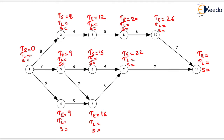For event 11, TE = max(26 + 7, 22 + 9) = max(33, 31) = 33. Similarly, we can find TL. If the TL value is not given for event 11, it will equal TE, so TL = 33. Slack equals the difference of TL and TE, so slack = 0.